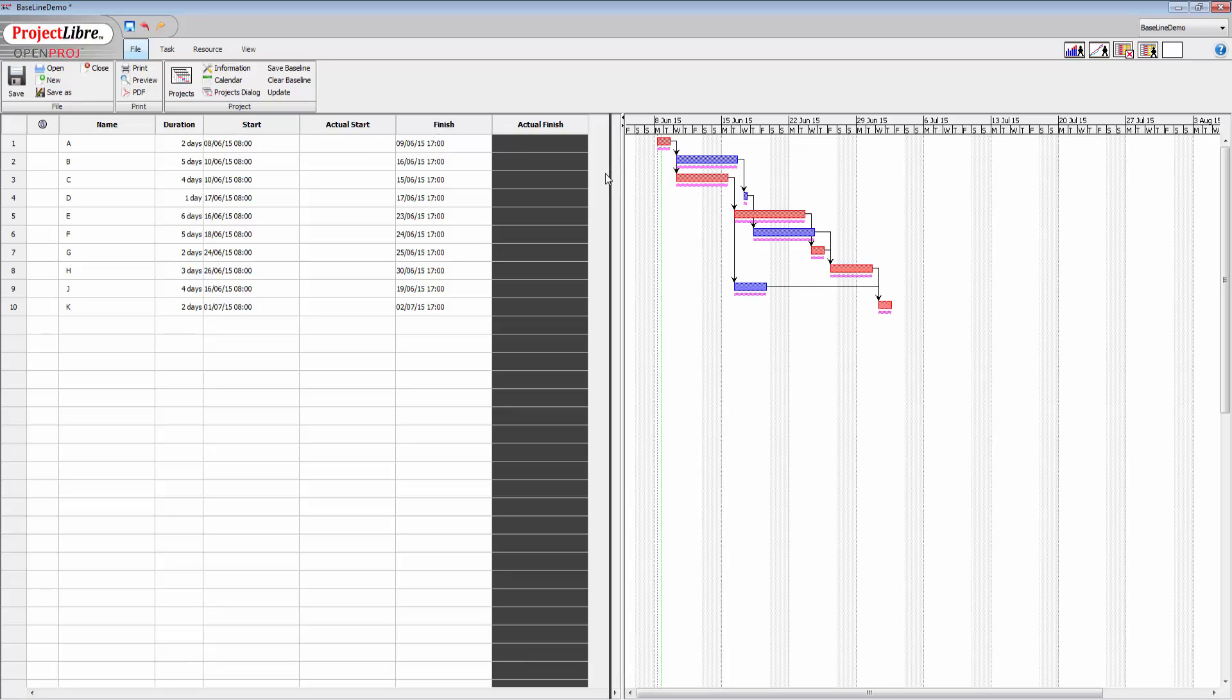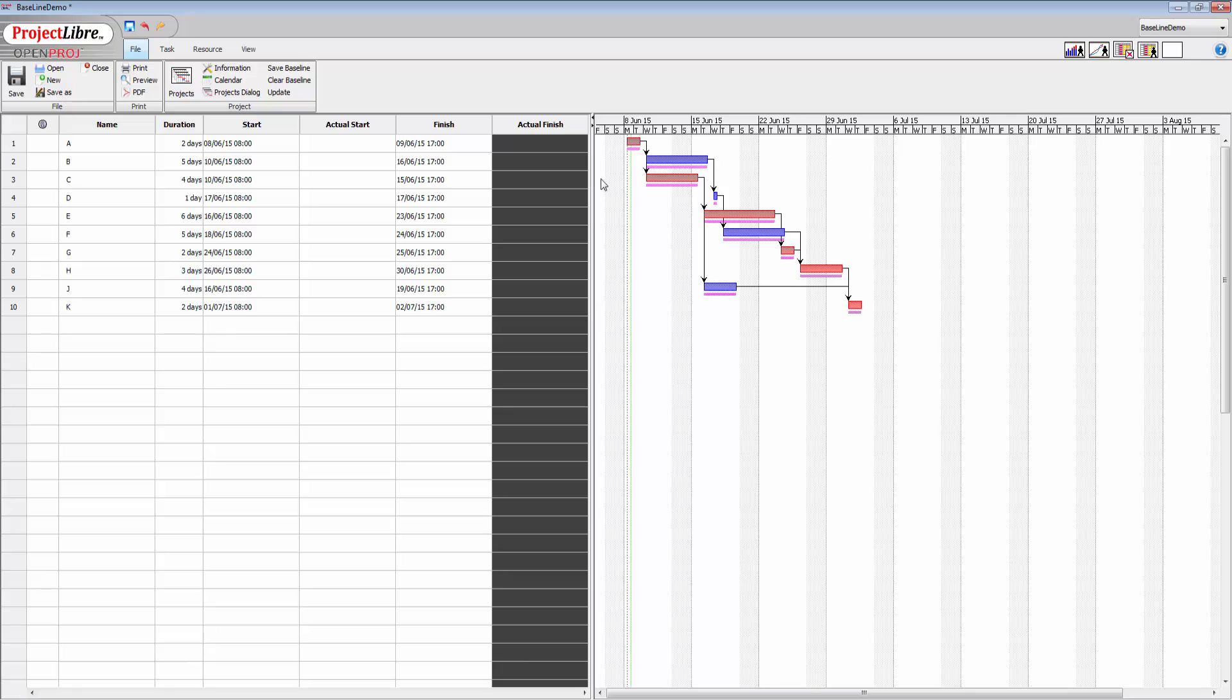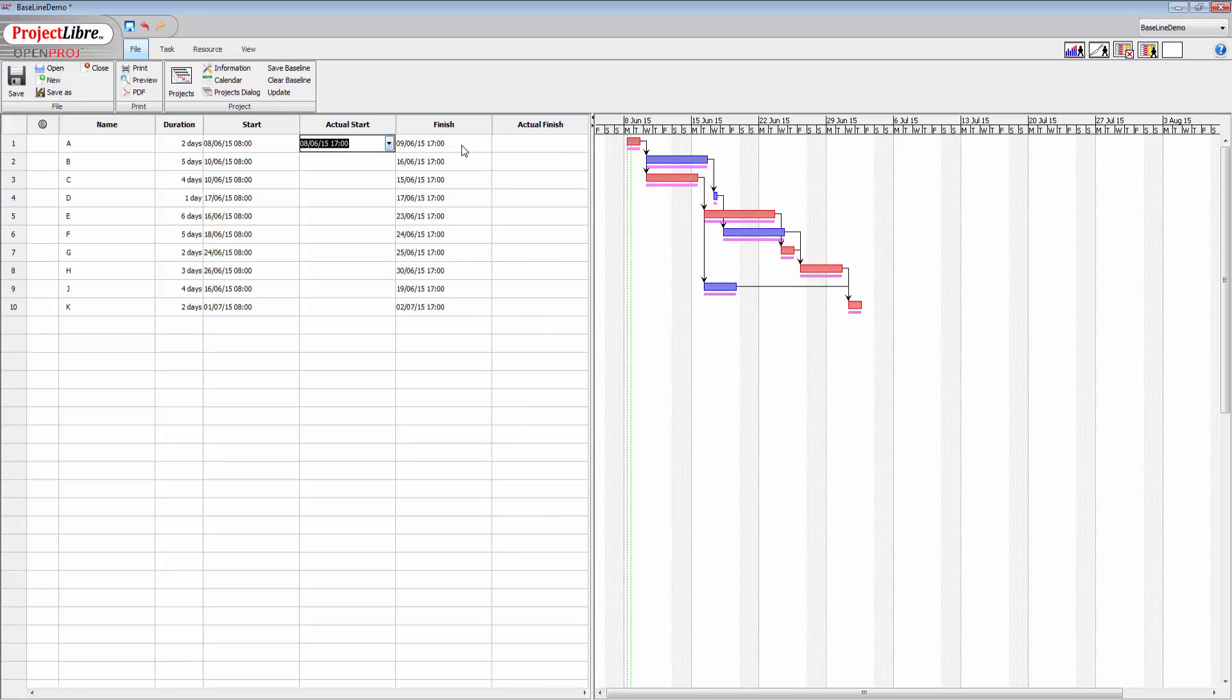Now what these baselines do is allow us to enter data into these actual start and finish columns here, which will push all of our schedule, but at the same time we can still see what the original baseline values were.